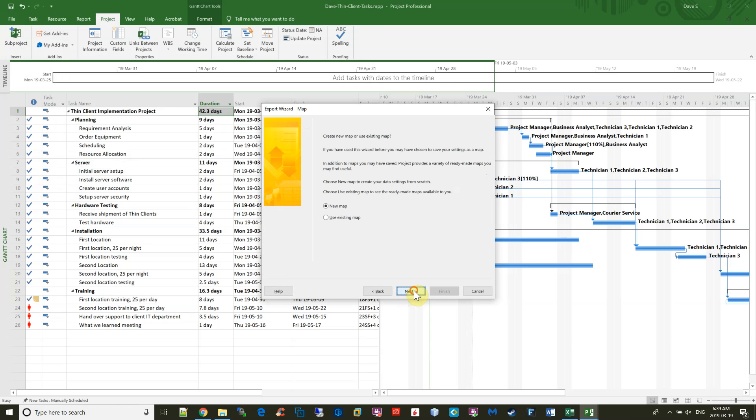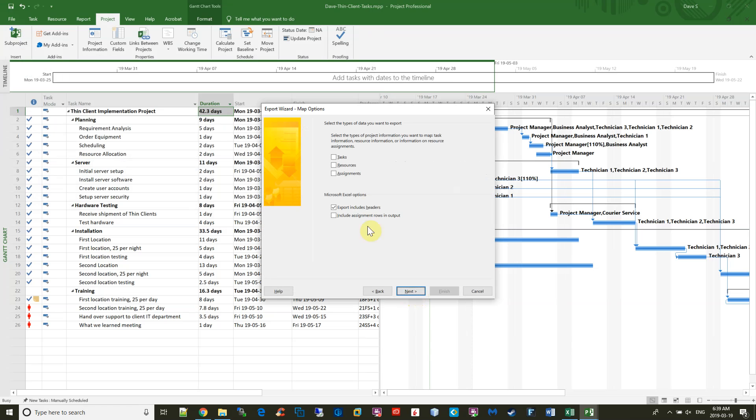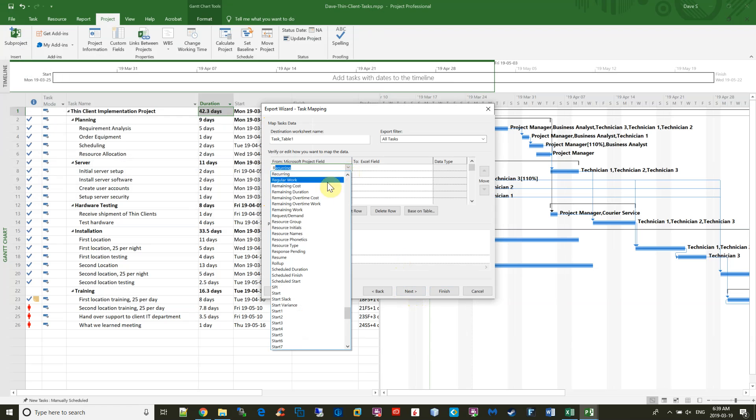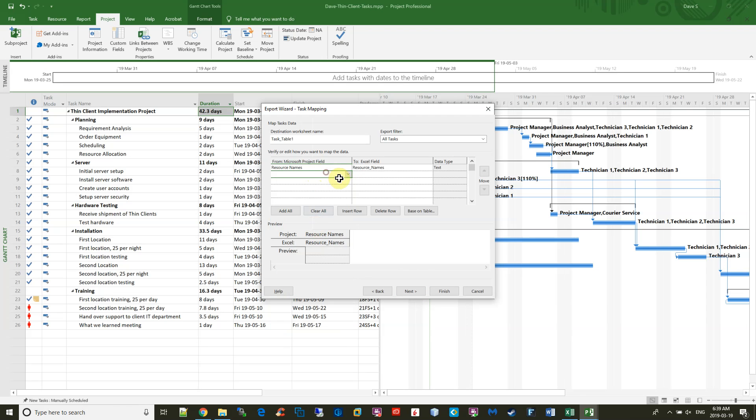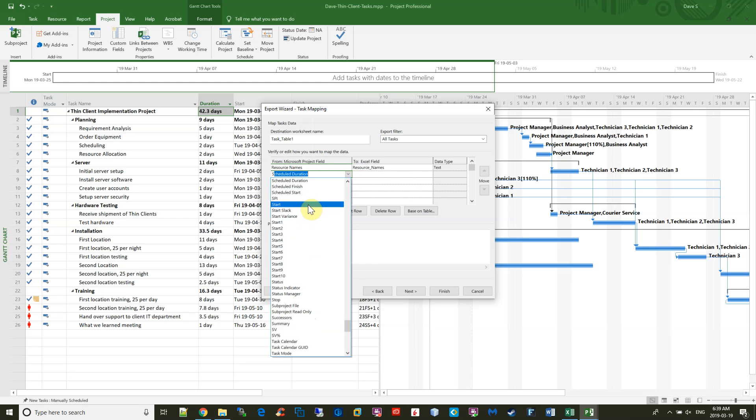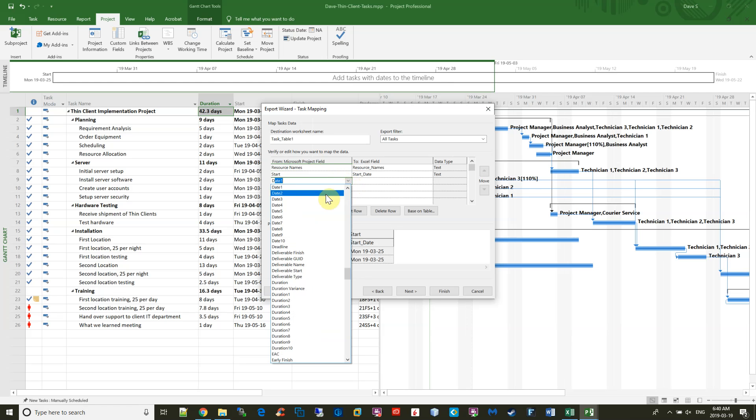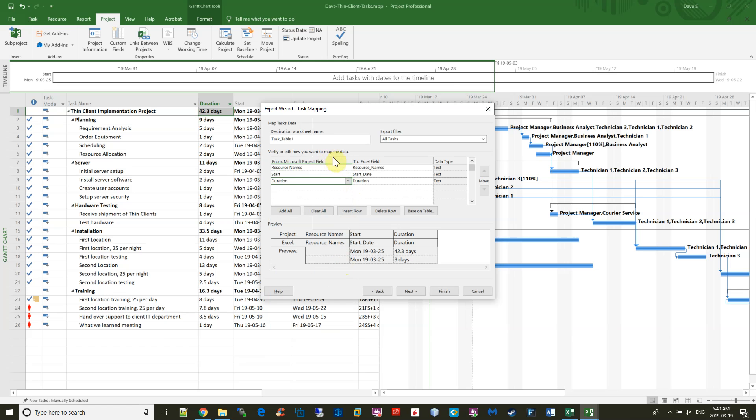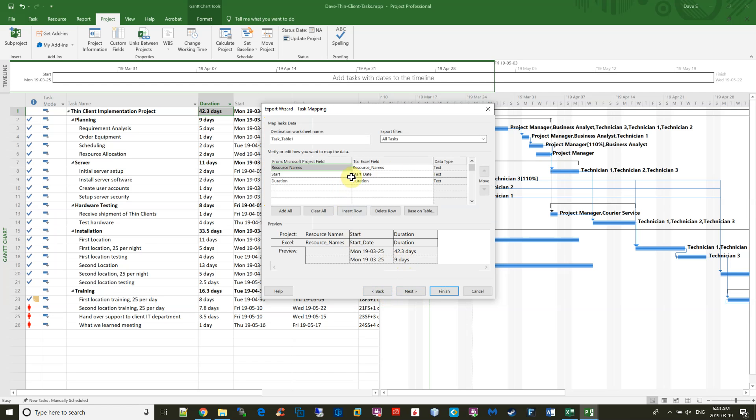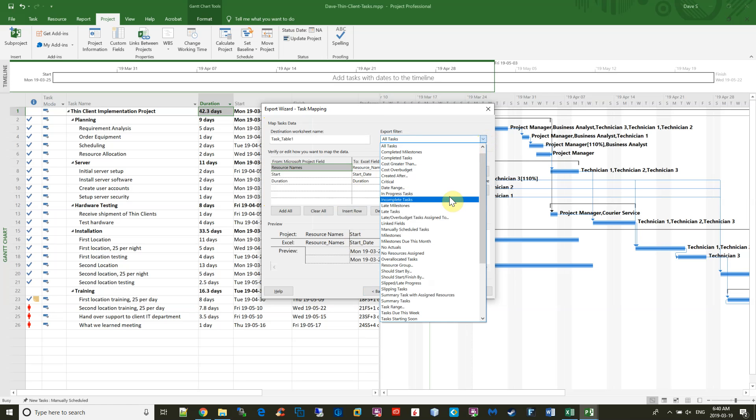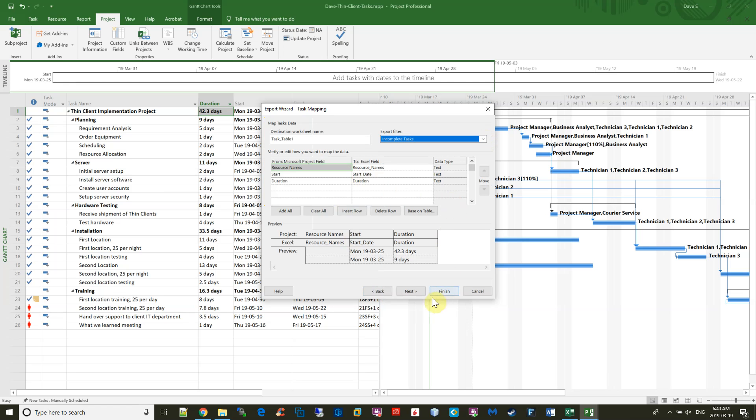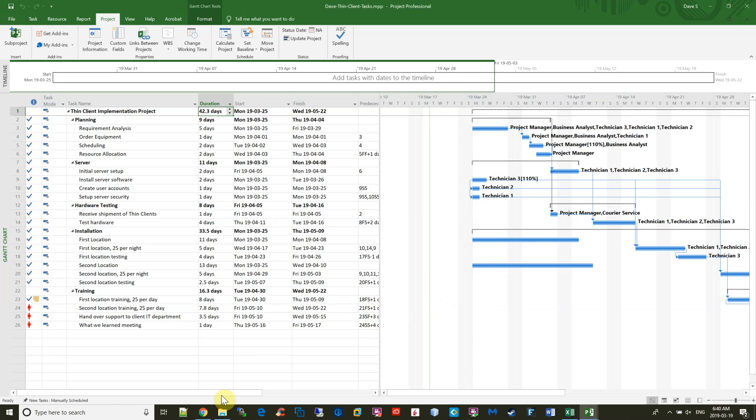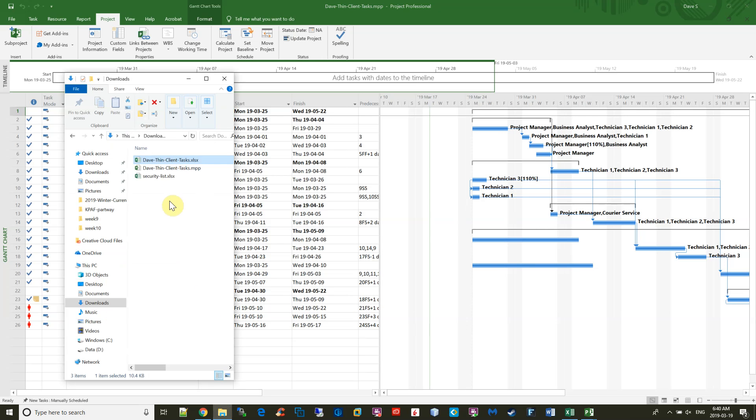A new map, just the tasks, and we're going to say we want the resource names first. Then you want the start time second, and the third thing you want is the duration. And everything's mapping perfectly, looks good. Say Next. Actually, go back. This would do all the tasks, and I just want the incomplete tasks, so choose incomplete tasks, and then say Next and then say Finish.